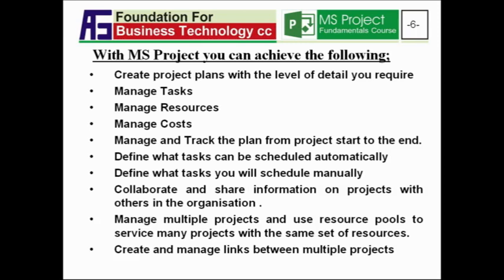With MS Project, we can also manage more than 2 projects at a time. So when you're working with multiple projects, we can use the same resource pools to service those different projects. If you've got one set of engineers, for example, you can schedule your projects in such a way that you can use the same set of engineers on all the different projects.